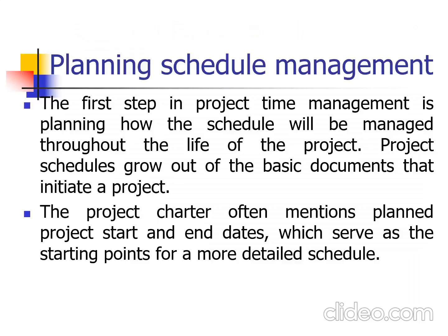So let us look at planning schedule management. So the first step in project time management is planning how the schedule will be managed throughout the life of the project. So project schedules grow out of the basic documents that initiate a project. So the project charter often mentions planned project time, start and end dates, which serve as the starting points for a more detailed schedule.